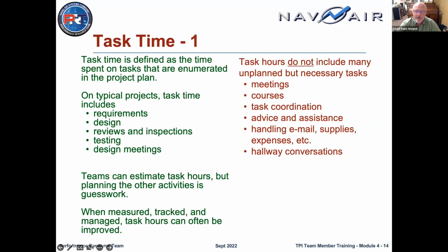If you don't have data and you ask them to be let out of the meeting, they're not necessarily going to let you do that. But if you can bring data to the table and say, you're costing us 30 or 40 task hours a week across the team, here's our alternative, then with that data, they will almost always let you off the hook and say, instead of making everybody go, you get your one representative.